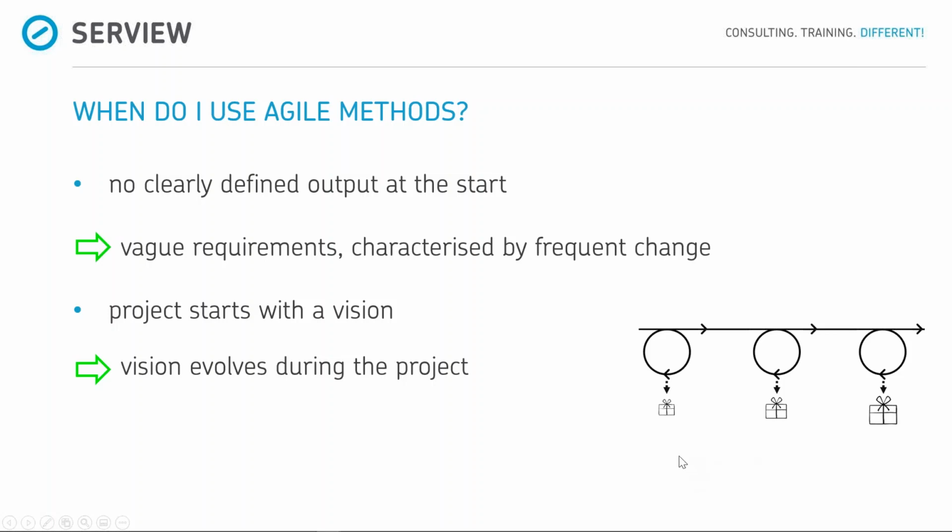So in agile methods, we usually heavily rely on service contracts. So that means that you will pay me time and material, and as long as we're happy, we have a contract, and it's an ongoing service kind of thing. Or we will talk about modular project management and contract negotiations. So if you're interested in that, there are some really nicely written books about this. And let me know if you have a question, and I'll just pop you an answer in the chat box as well. So, quick summary.